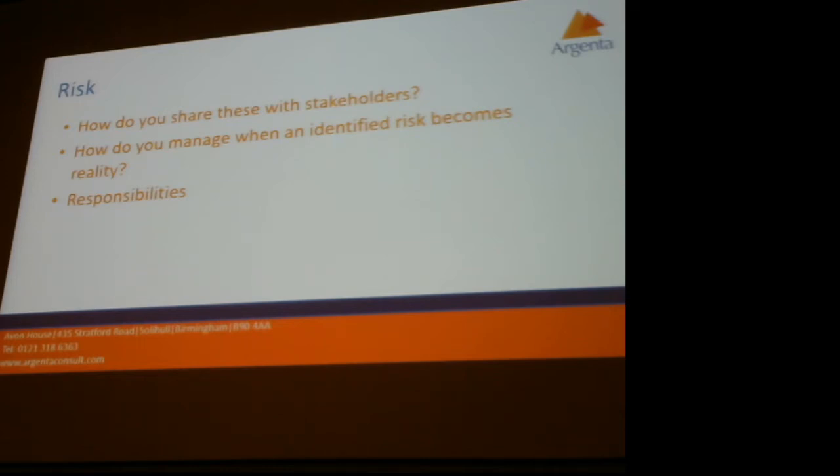The process forces us to identify risks early and then bottom them out before they might even occur, and you've got a plan if it does happen. So the FMEA will say, if you mitigate the risks as much as you can at design stage, and then you test for anything that you can't design out, you already have a fairly good idea of what could happen.